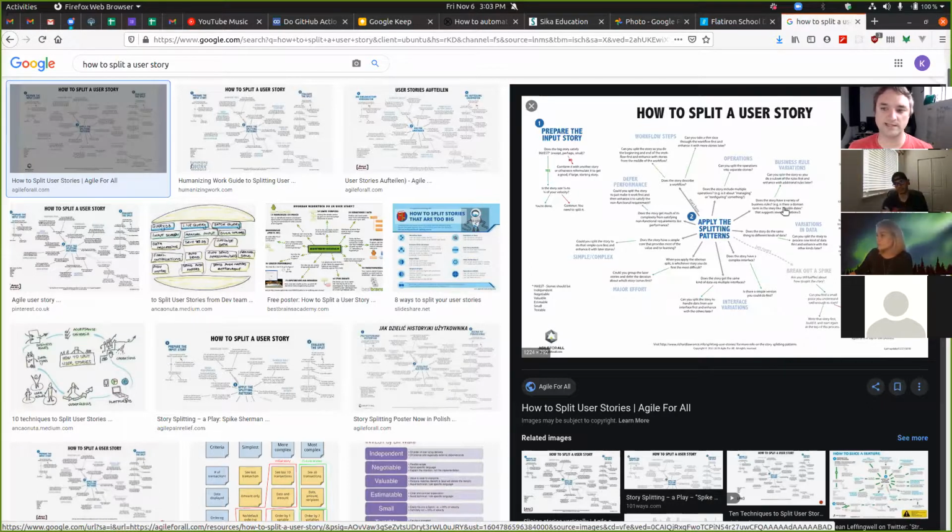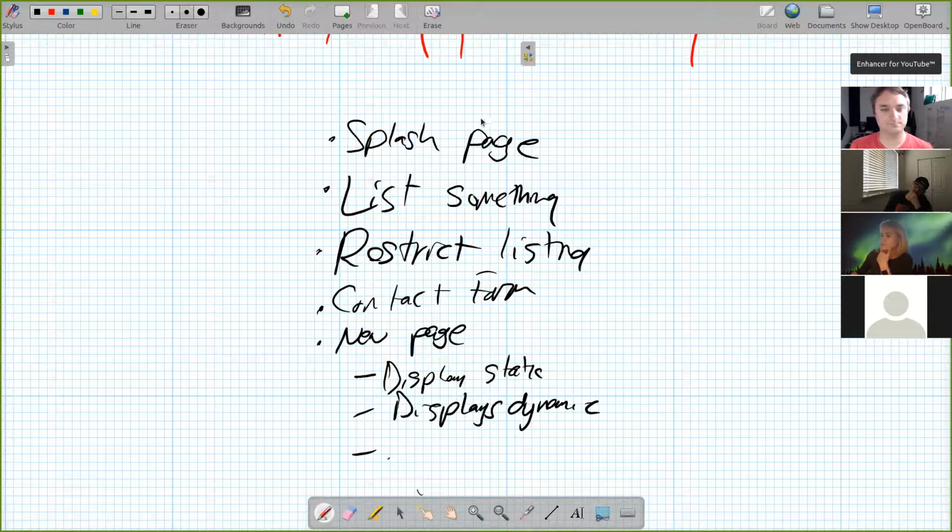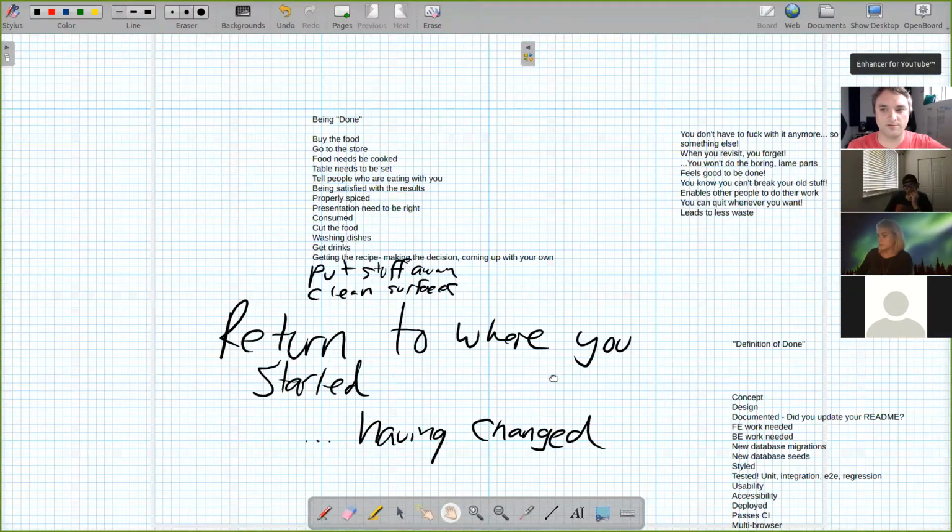Business rule variations, that's things like, all right, we take a bunch of different credit cards. What if it's only Visa, and then as a second story, accept other cards too? So I've taken this fat story, made it a little bit smaller, more manageable. Because once you've done one of them, doing more of them is a lot easier. Other questions about old thin vertical slices?